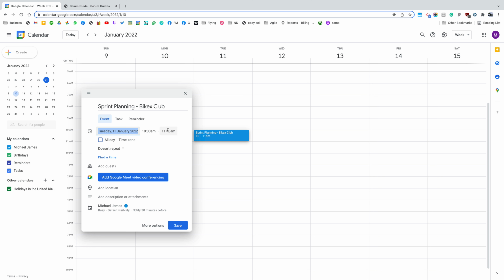It should be no more than 8 hours for a monthly sprint. We're doing 2 weekly sprints. So you might say that 4 hours would be the right amount of time for sprint planning. Maybe you could do it sooner than that. Let's put it in for 3 hours. Of course, we can always have a reflection on this at the sprint retrospective to find out if that's too much time or too little time and make an adjustment for the next sprint if we need to.